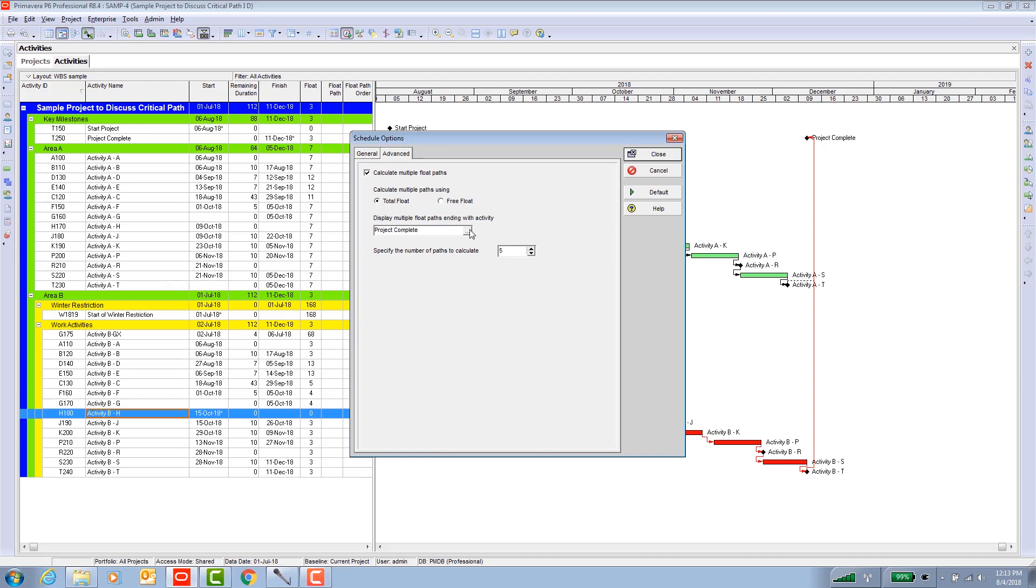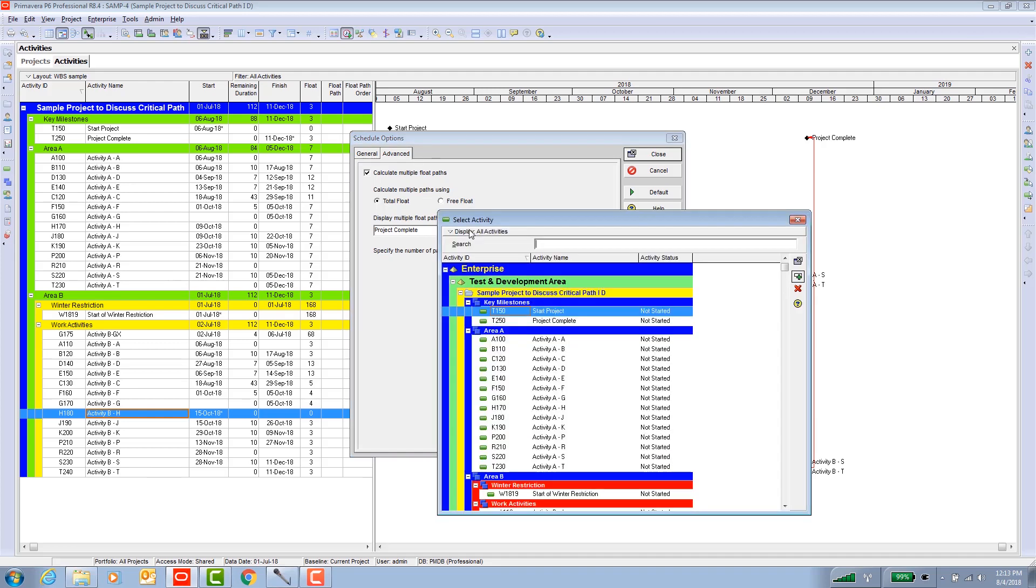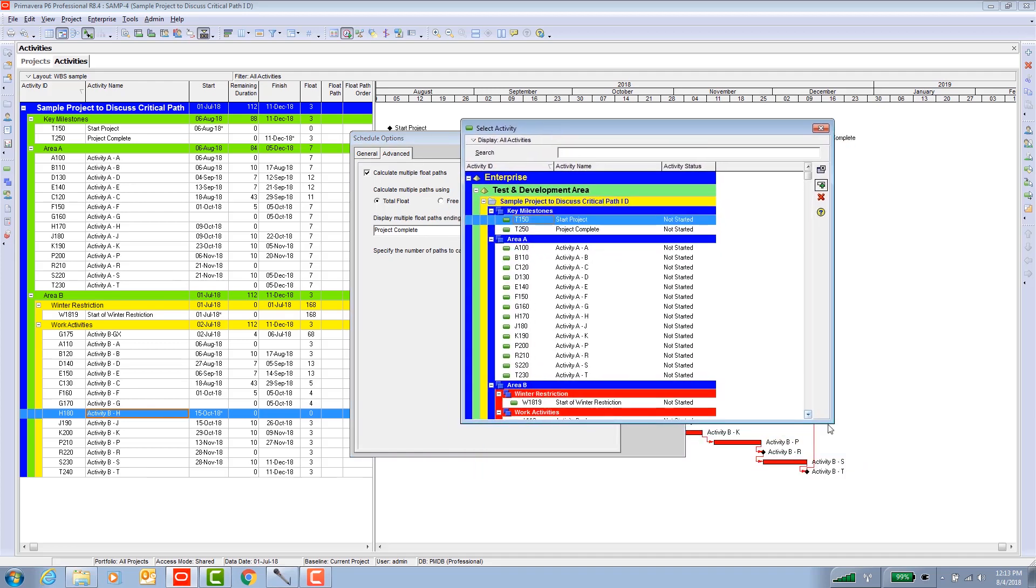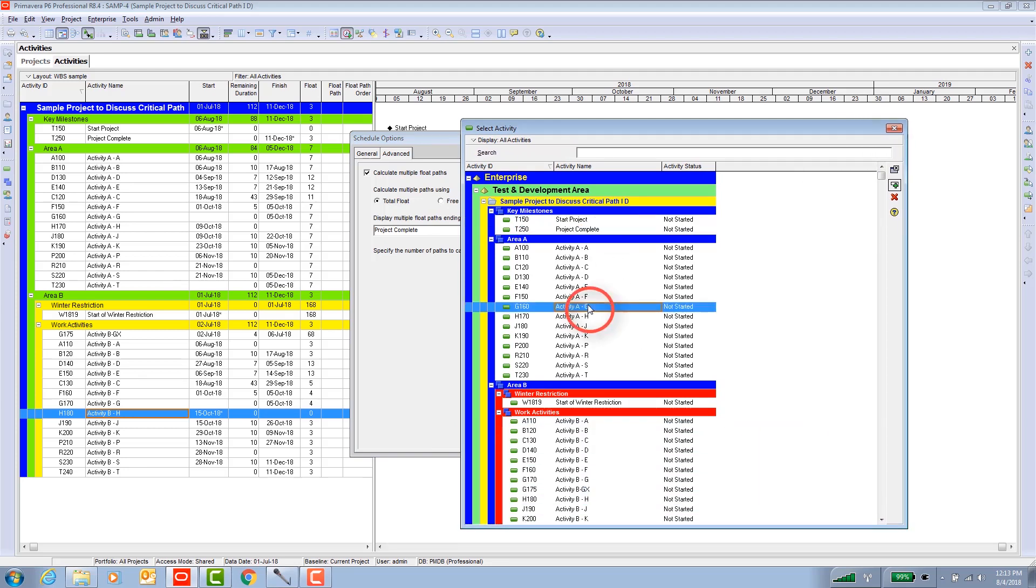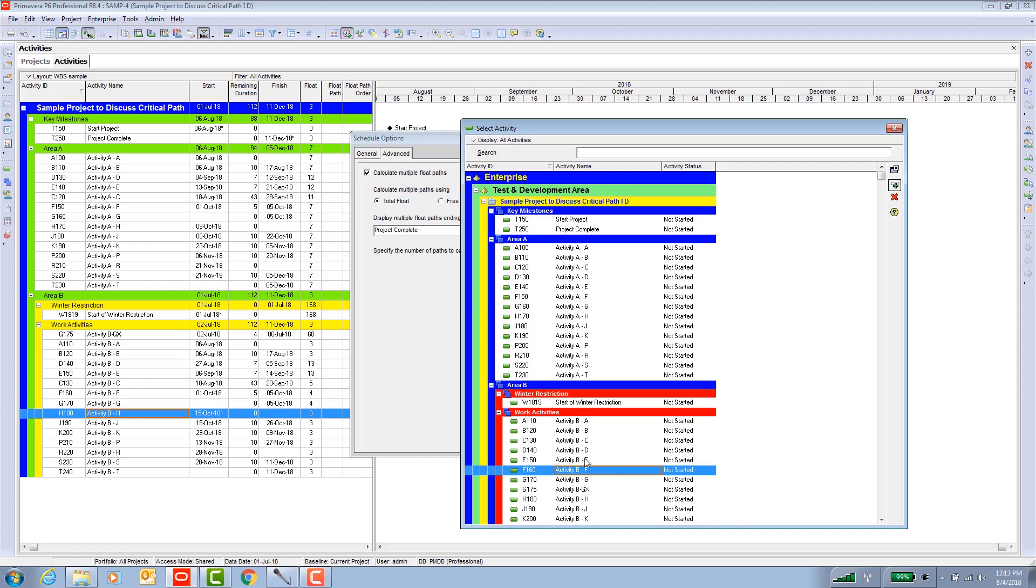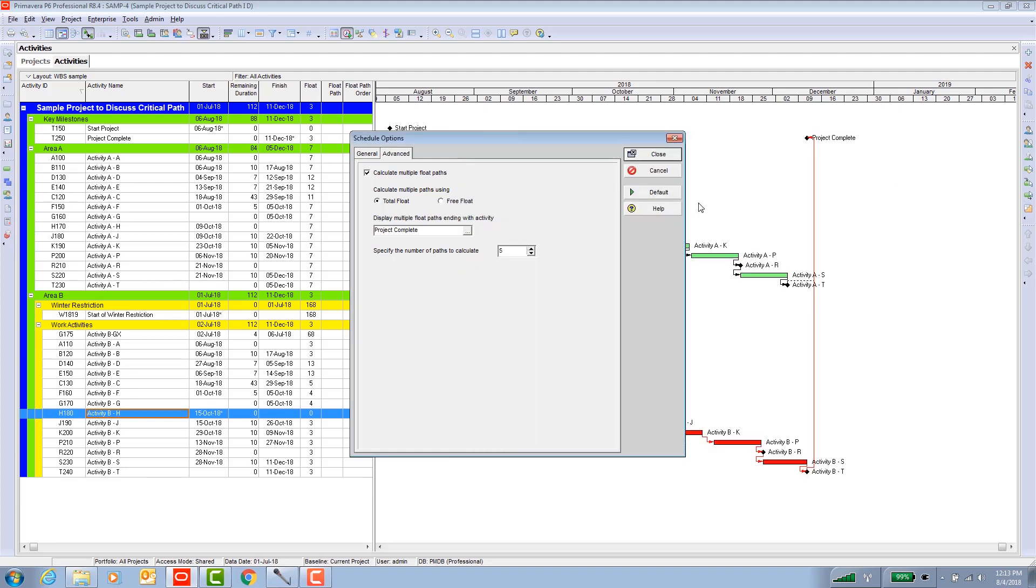And then we're going to choose the final project completion activity. Now mind you, and this is something to remember that demonstrates the power of this function, is you do not have to choose the final activity. If you wish to analyze some activity in the middle to see what's driving that activity, this is a very good function to remember. You can do that especially when you have complicated projects with interim milestones and like that. So that's something to keep in mind. For the first round, let's use the project completion just to show what happens.